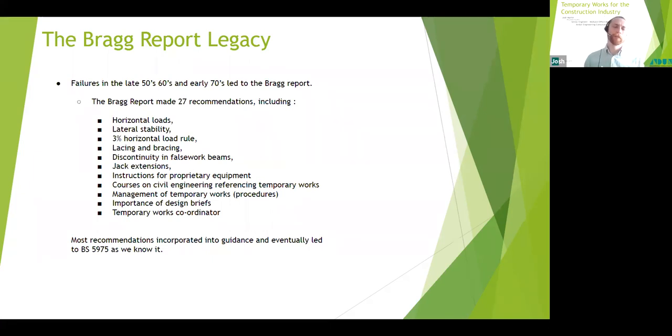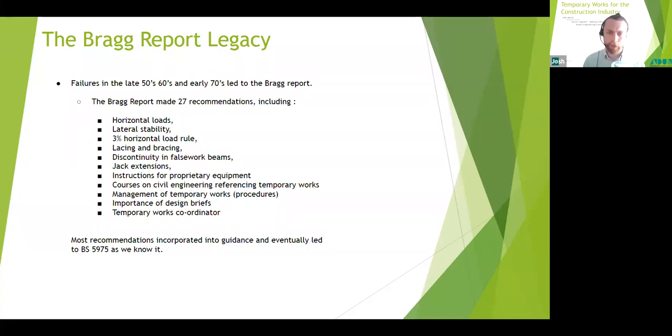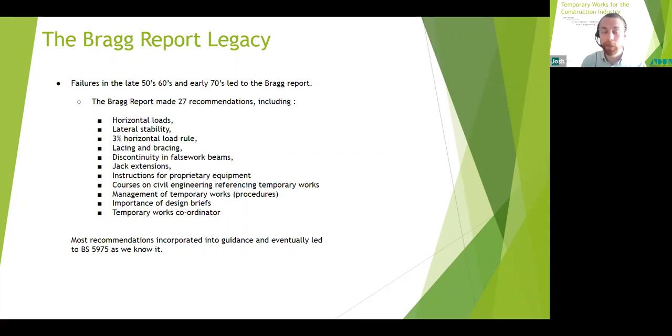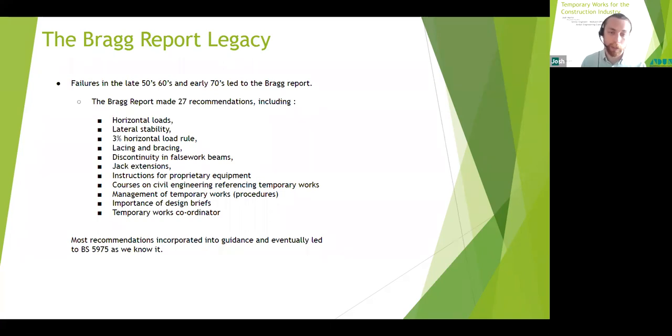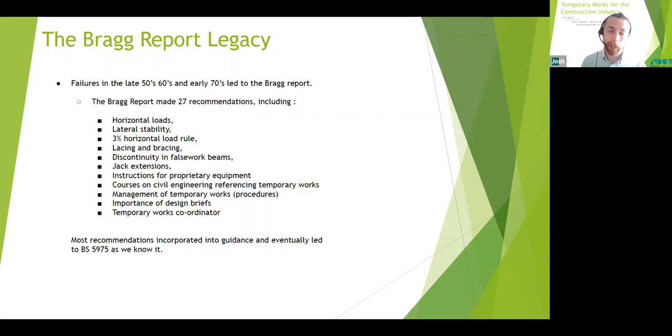And it's also worth mentioning at this time as well, the publication of this report, that the construction industry was very different to what it is now. Health and safety legislation was beginning to bring improvements onto sites, and there was little subcontracting of construction work, with most trades being carried out by the main contractors' operatives. But now most construction work is subcontracted away from the principal contractor, which is why the CDM regulations play a key role in ensuring the duty holders are competent and those appointed plan, manage, and monitor their work—in this case, plan, manage, and monitor temporary works.